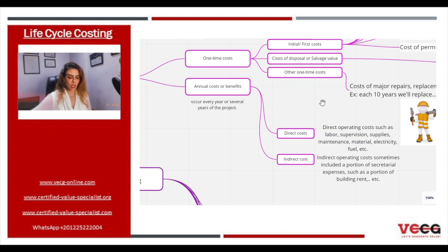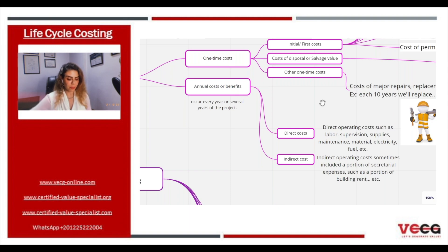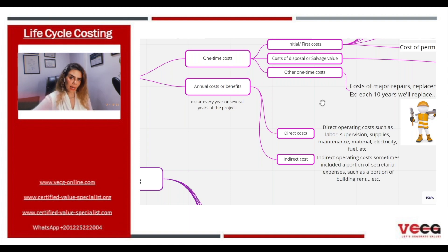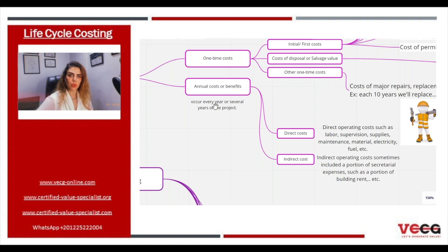We have another type of cost, which is the annual cost or benefit. These are costs which occur every year or several years of the project. This type of expense breaks down into two types: direct costs, which represent the direct operating costs such as labor, supervision, supplies, maintenance, materials, electricity, fuel, and so on. And indirect costs — indirect operating costs sometimes include a portion of secretarial expenses, a portion of building rent, and so on.